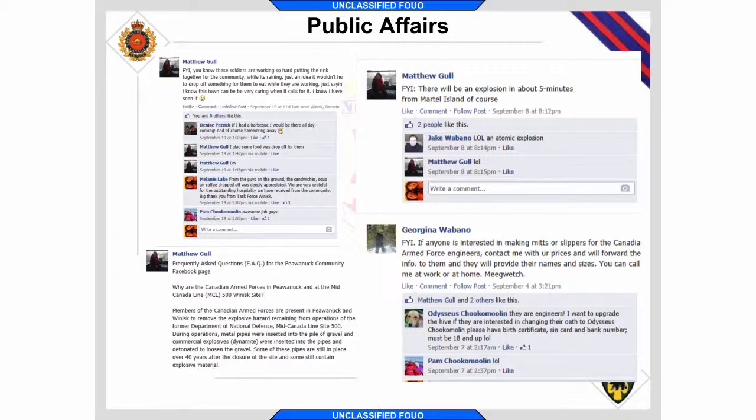Next, please. Public affairs. We did a lot of interface with the community while we were up there on the recce. We had a meeting both with the town, with the band council, and with other reps from the community, and talking with them, we determined the best way to communicate with the community and get messages out, when we need to let them know about explosions or when to stay out of that area, was through the community Facebook page. So working with the public affairs folks, they told us we can't post onto their page.